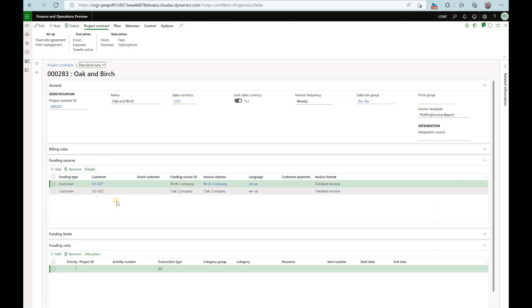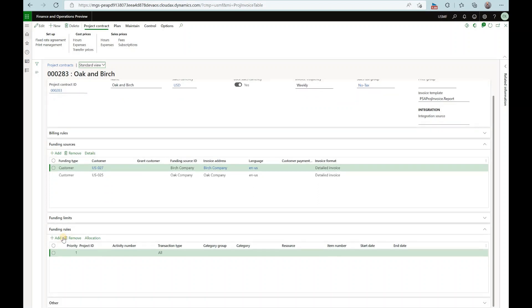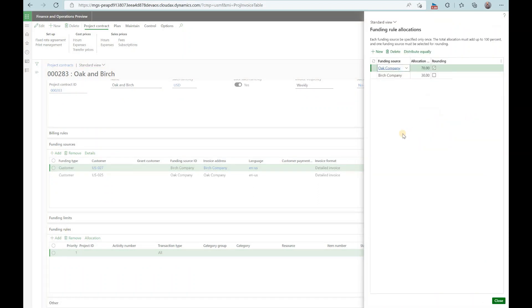Here I have two customers, Birch and Oak Companies, set up as the funding sources and I have a single funding allocation rule. So let's take a look at this. 70% goes to Oak Company and then 30% goes to Birch.